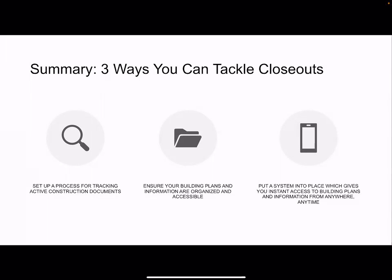Take those active construction projects that you have. Start a move forward process to manage that information digitally so that at project closeout you're not waiting 6 months on it. You're not waiting a year on it. You're talking weeks, a month. You're accessing this information quickly, and everybody's accessing it, not just during the construction process. It's also now passed over as a tool that your facilities can hit the ground running with. They're looking at the most recent stuff.